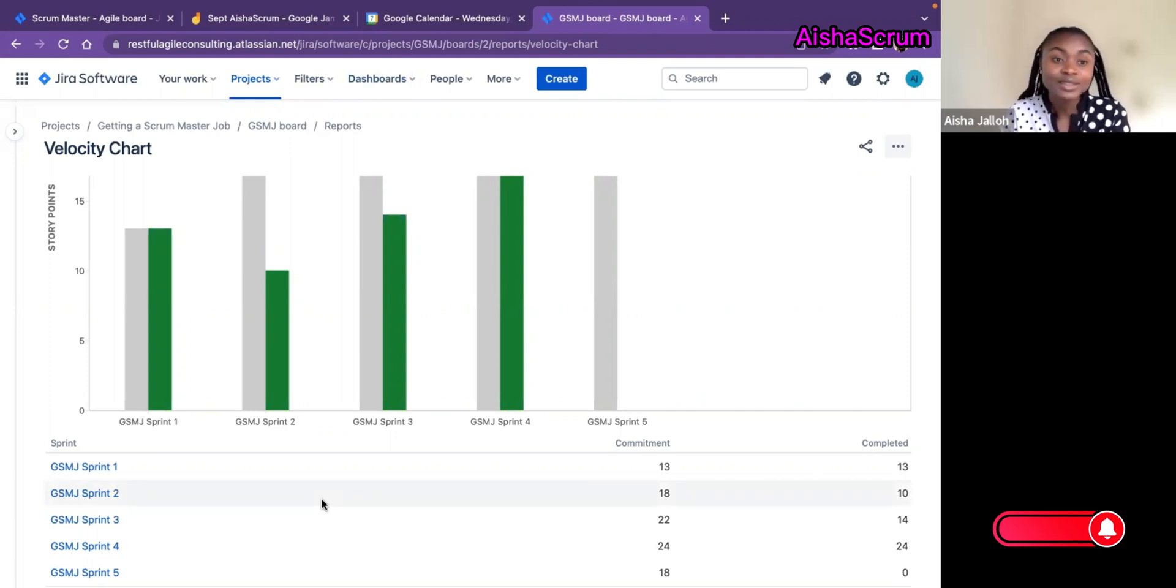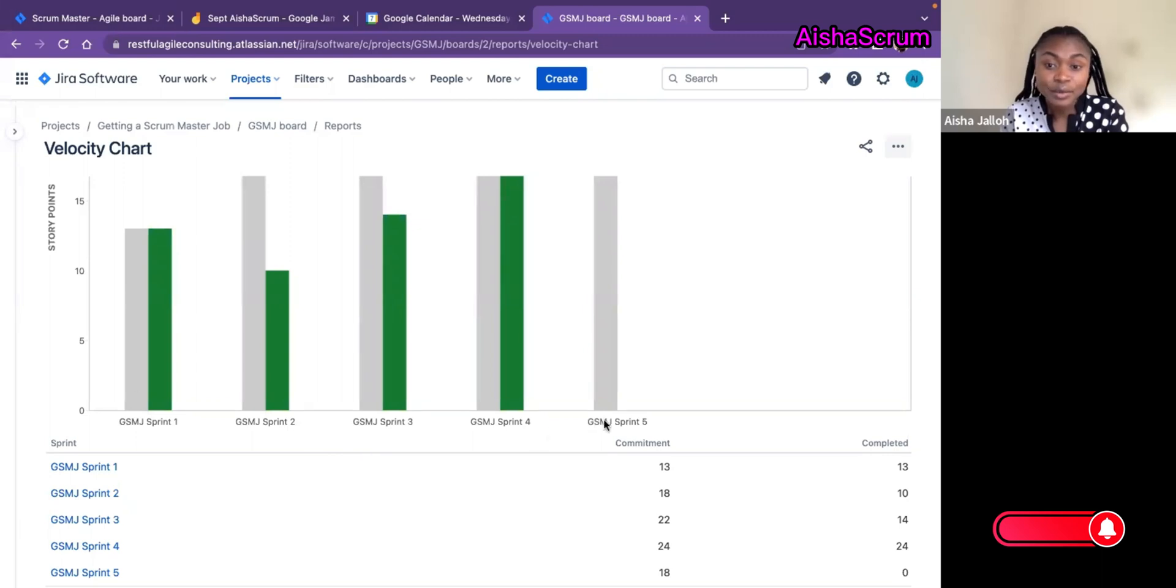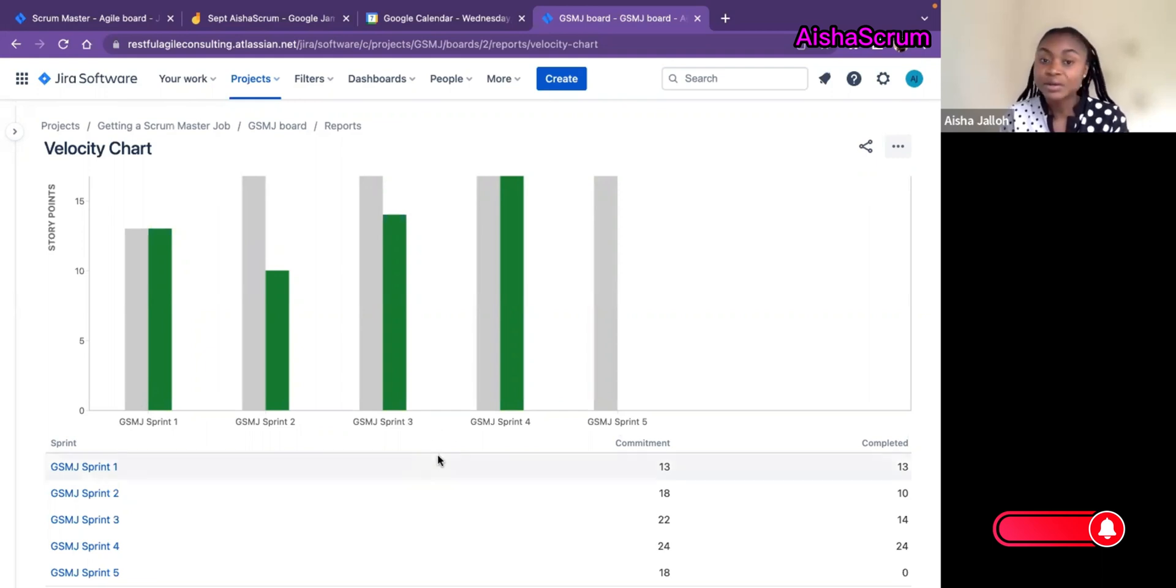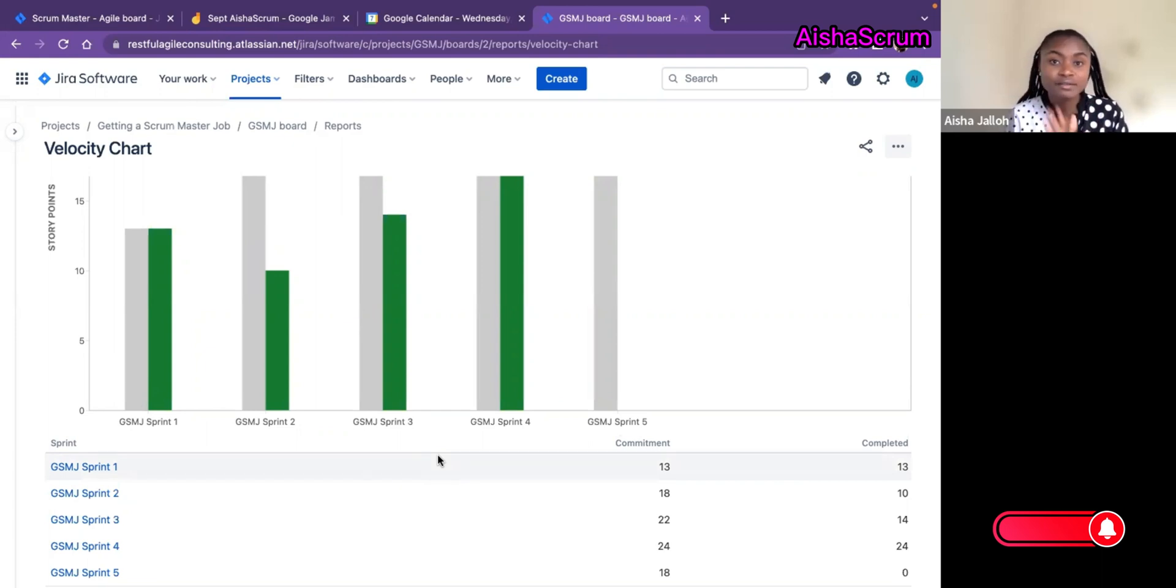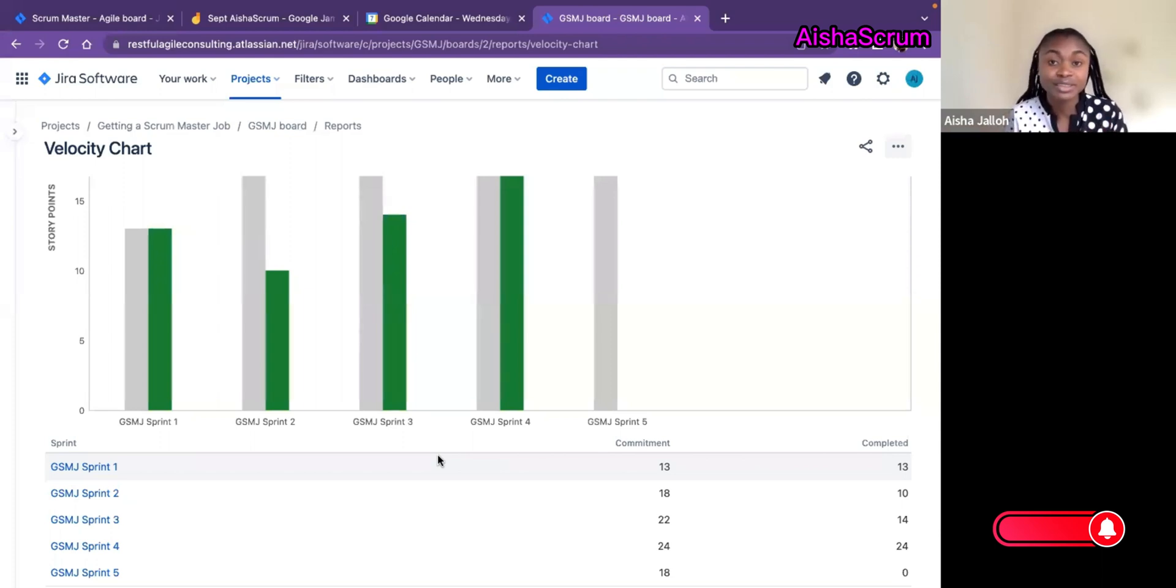On the y-axis we have numbers in story points. On the x-axis we have the sprints. We have Sprint 1, Sprint 2, Sprint 3, Sprint 4, and Sprint 5. Basically this is like a whole quarter. Depending on your environment, if you work in SAFe, sometimes that can be one PI—five sprints in one PI. If you work in an environment which is OKR, it can be quarterly. In a quarter you can have these multiple sprints, and then we can look at the velocity and see how many sprints we need to predict we can complete this given value.